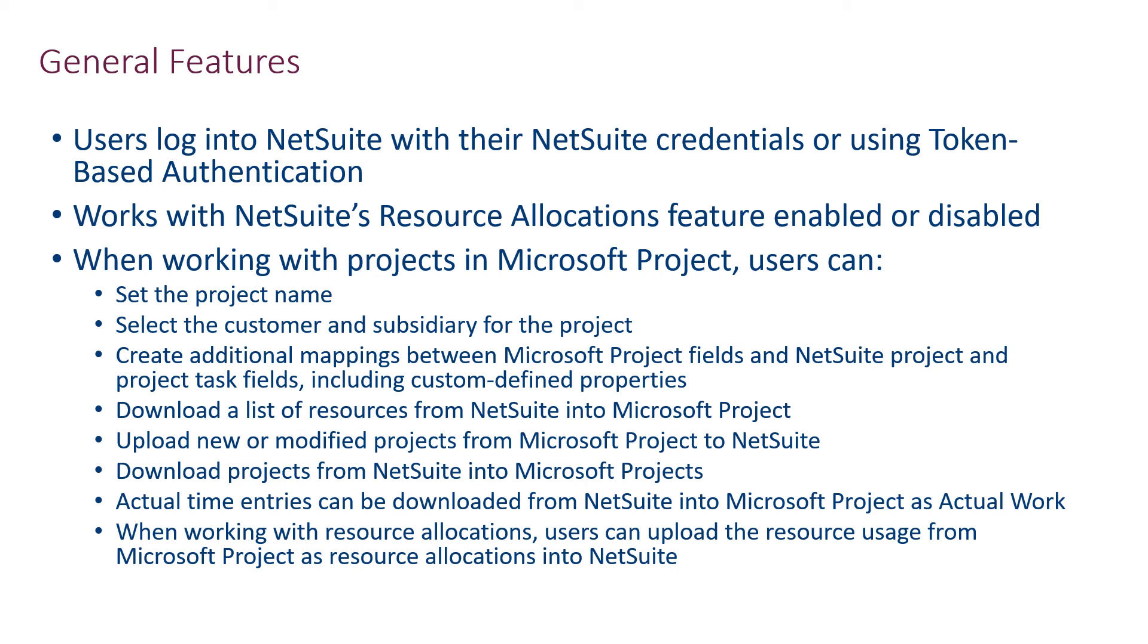If a project manager is unsure about which resources are available in NetSuite, they can download a list of resources into Microsoft Project. The saved resources will include their standard rates for use in project costing inside of Microsoft Project.